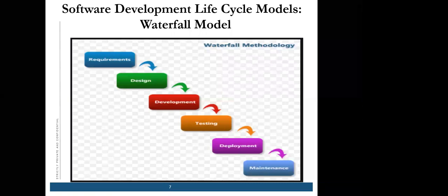Okay, so this methodology is best suited for short-term projects where the requirements don't change. For example, like attendance management or a calculator, their requirements won't change, because once you are done with this phase, then only you can go to this phase, and then this phase, and with this phase you cannot go to your previous phase. So that's why if the requirement is freezed, or there is no change in the requirement, that time we use this waterfall model.